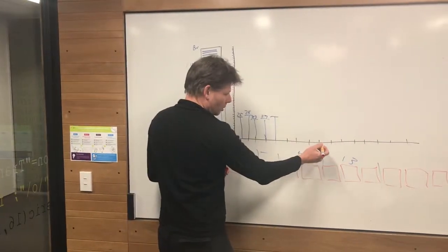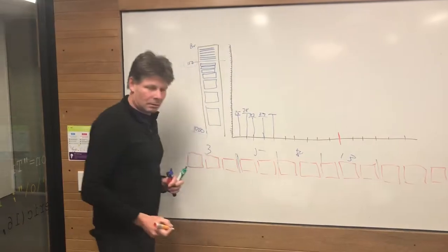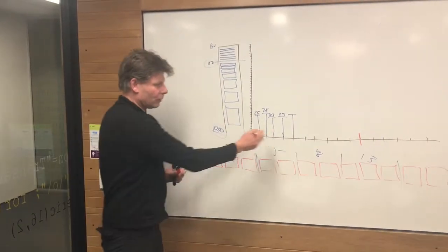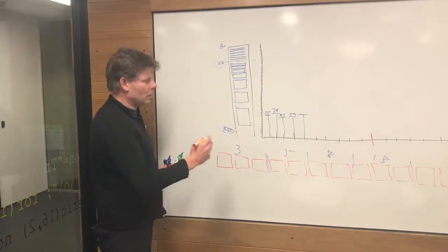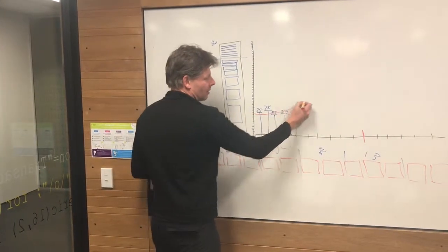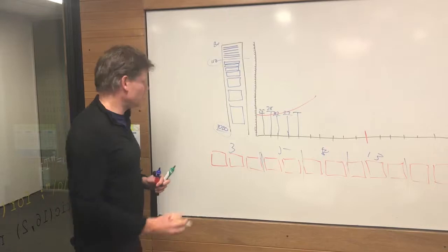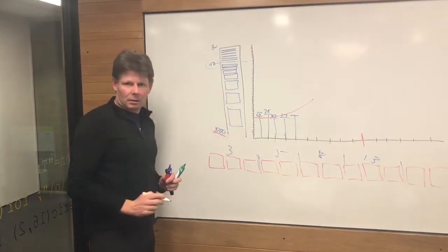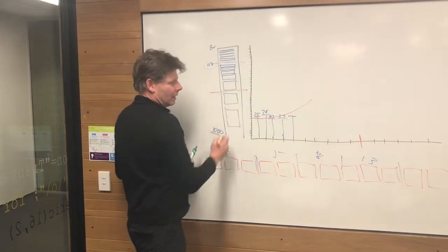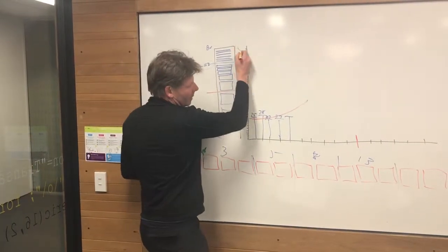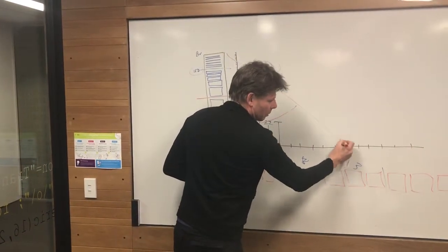"Well, hold on a minute, we need to go live with this by sprint 10. You've been going for 5, so you've only got 5 more sprints to go. The rate you're going, perhaps you're going to start to accelerate, and the teams were getting faster, but there's absolutely no way you can do 1,000 points." He was right.